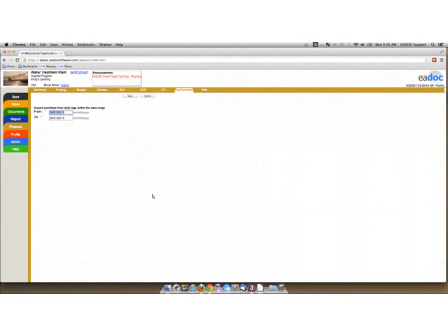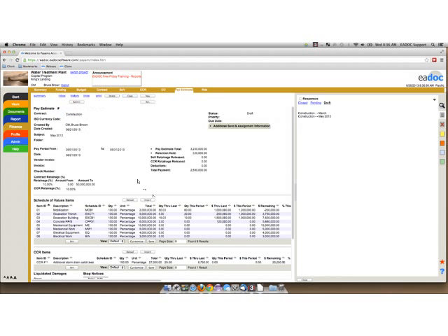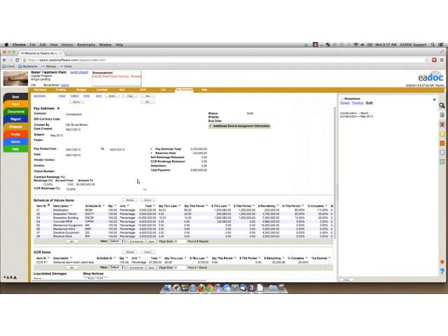Once those daily logs are approved, then you will be able to import them into the system. So I'm going to select my date range, which is the 1st of May to the end of May, and I'm going to go ahead and click Save. And when I do that, it imports all of those quantities that I had on my report that come from those approved daily logs.